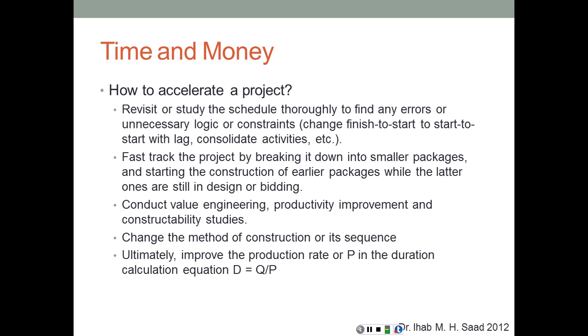Change the method of construction or sequence. All of these are different methods to accelerate: using different methods of construction, using different equipment, using different materials that can accelerate the construction. Conduct value engineering, productivity improvement, and constructability studies.